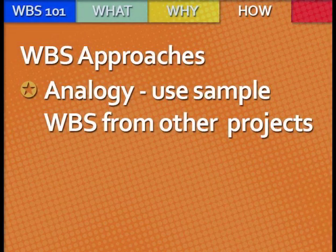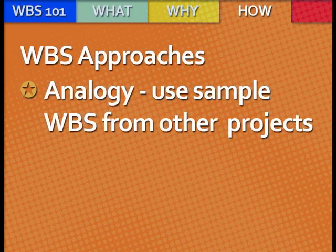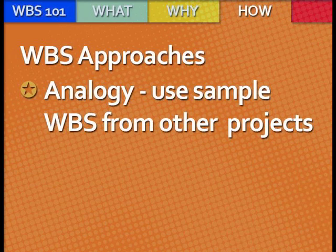There are many ways to approach the development of a WBS. First, there is the analogy approach. This method will review a WBS from a similar project as a starting point. This approach is effective because it allows the project manager and their team to view sample WBSs before creating their own.